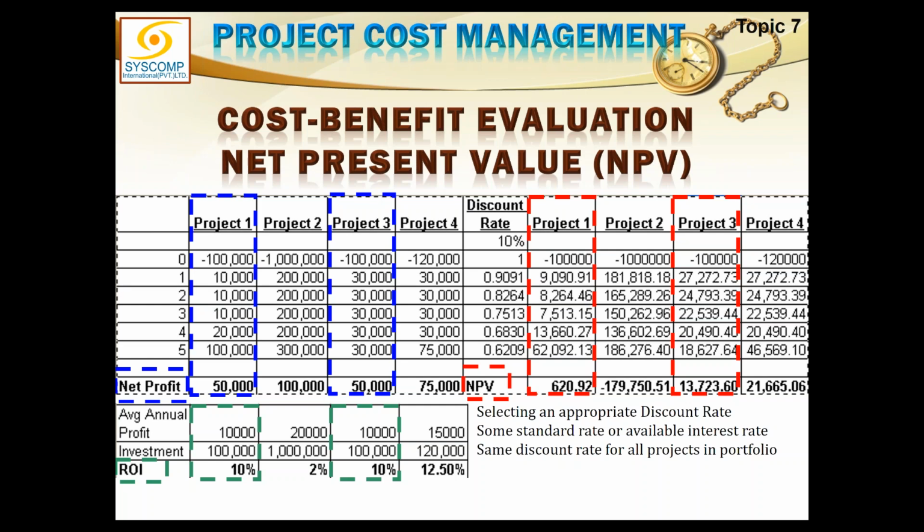I don't know the internal strength of my project or my option. But I know one thing, that there could be a percentage at which my NPV will become 0. And what does that mean? That this is the break-even point. At that percentage, I would have equaled my cost and benefit from the present value point of view. So if somehow I can find that percent, that is the percent from where onwards I will be making profits.